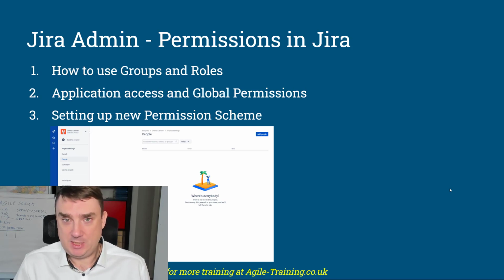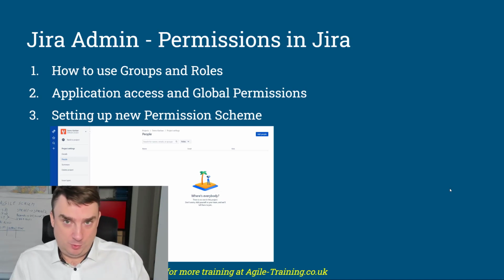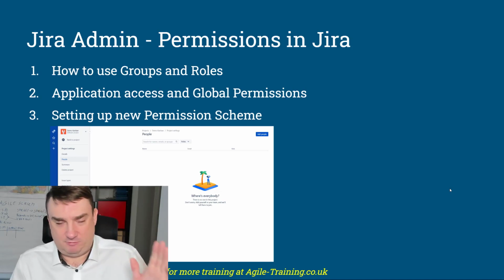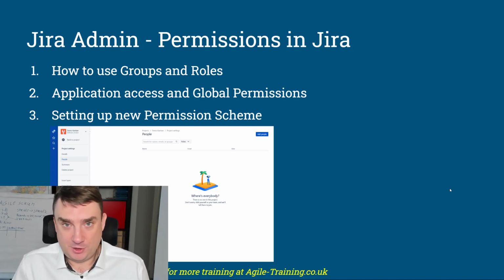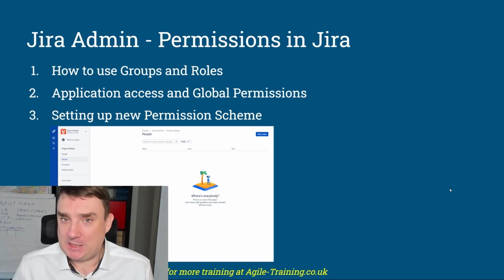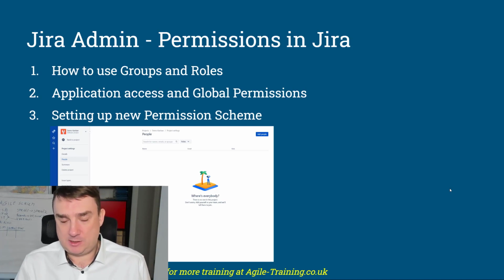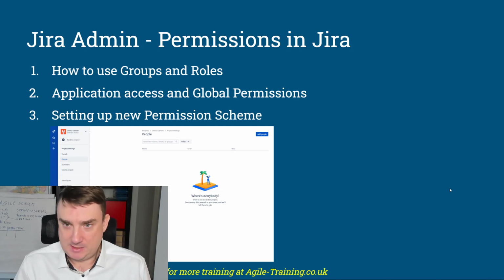I know they can be a little bit confusing. So in our case, we're going to create those 3 groups for our DBIM project. It doesn't really matter if it's Scrum, Kanban, or just project management. If you're using Jira Cloud, that's very important: on the free version, you won't be able to perform these operations. Really sorry, but that's how Atlassian decided to do it. So you need at least the $10 license. Of course, in Server it's not the case. You can replicate it very easily. It's just going to be one little difference in the naming, because in Server there are no people.